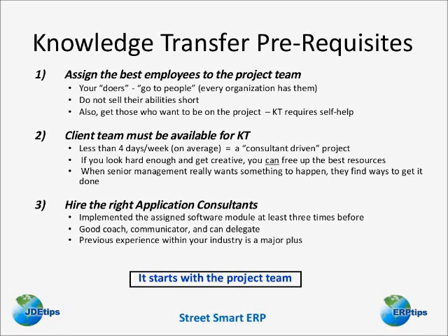As far as knowledge transfer goes, you have to be available for knowledge transfer. A consultant or no one else can transfer knowledge to a client that is not available. I always say, your team has to be committed to the project on average four days a week. You start slipping below that number, and you know there's not going to be a lot of time for knowledge transfer. The consultants are doing a lot, and it's going to become a consultant-driven project.